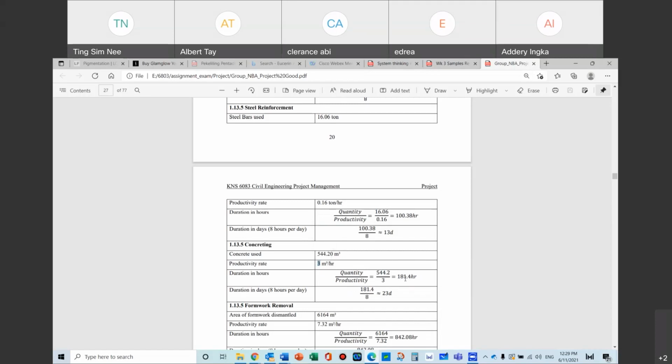And then with the Gantt chart and also the quantity of materials that you have, you will build a costing sheet. In your costing sheet, you will have your material, your work breakdown, total material, and your usage of labor and machineries based on time. And then from there, you will calculate your rate. For people who have a rate in their hand, like the JKR schedule rate and all that, it's easy.